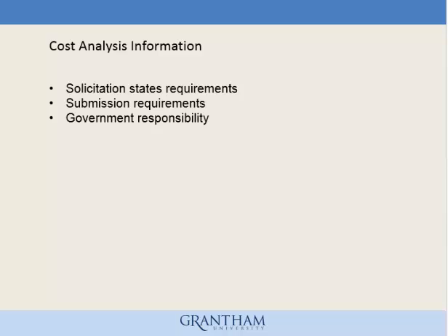The solicitation must state whether pre-award or post-award access to offerors' records is necessary. The solicitation should state the format required for submission of the cost or pricing data or information other than cost or pricing data. The government cost analysis information begins with market research by examining related contract files, relevant audits, and technical reports.